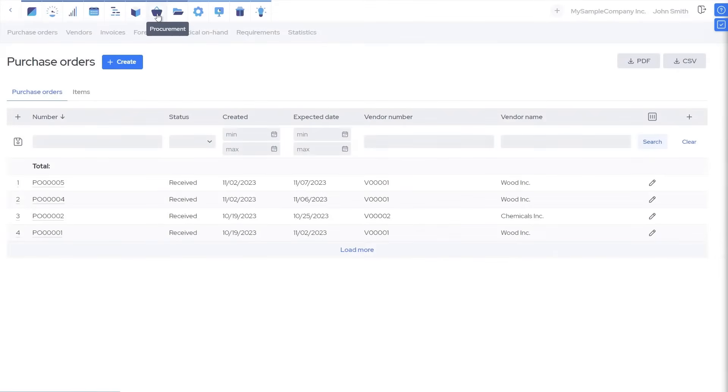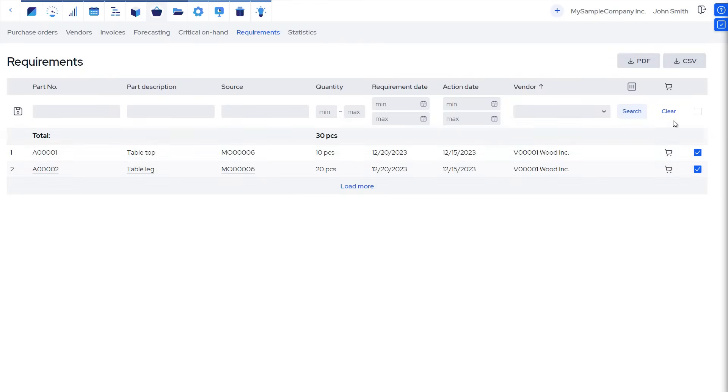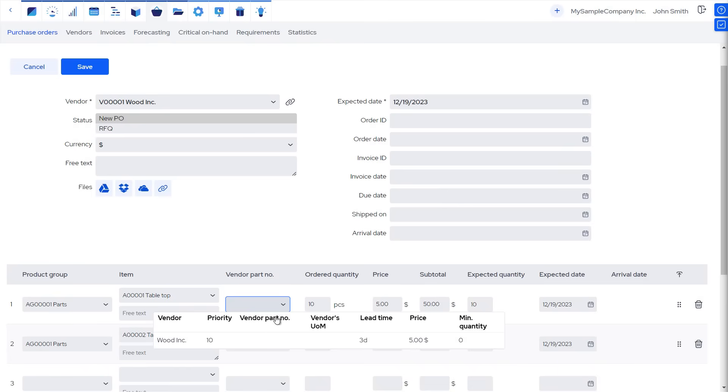In the Procurements section of MRP-EZ, the reports show you exactly how many materials are required, when, and where. For example, we will use the Requirements report to create purchase orders for missing quantities. The software knows the prices, vendors, and lead times already, because what we call purchase terms have already been entered for each item.